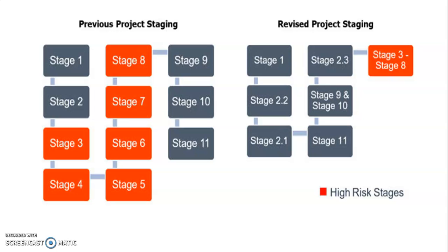Then the fourth stage should have detailed design, working drawings and tender action. Here you need working drawings, engineering details, bills of quantities, then calling tenders. The final stage is the contract and construction. Here you need assessment of tenders, award of contracts, construction, and engineering commissioning. Then the commissioning should have staff assembly and training, equipment and supplies assembly, then testing of installations.